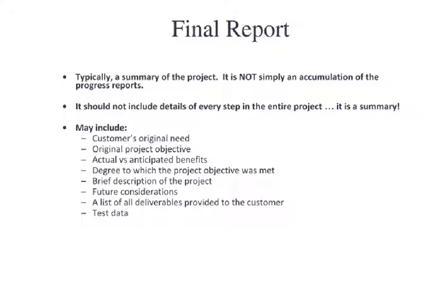If future work needs to be done, or future consideration, or future testing, or upgrades, it's a good idea to list those in the final report so that it's documented. This is somewhat to protect you. This way you have informed the customer and you have informed your upper management that these things were considered and were identified as being important, but the current budget and the current scope doesn't allow them. But you have expressed and documented the fact that they were identified so that you have that record.